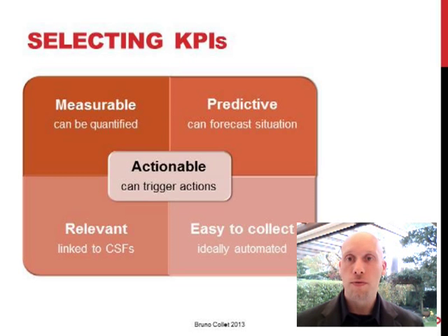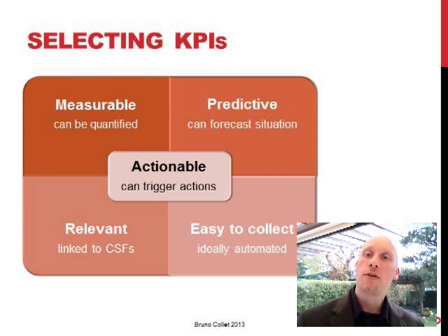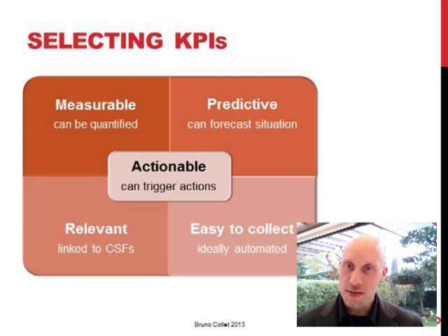So we have to make sure that our feet touch the ground here and that we can collect these metrics efficiently. One of the ways to collect them efficiently is to have, for example, a project management office that will provide organizational assets to automatically calculate some of the raw metrics or raw data on which KPIs are based, because KPIs might differ from project to project. However, the underlying metrics and data will often be the same in every project. A simple timesheet application, for example, is a very good example. It provides a lot of raw data that will be used in different KPIs.